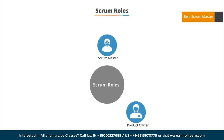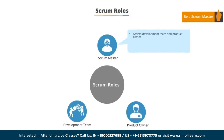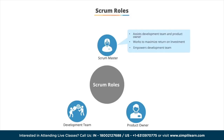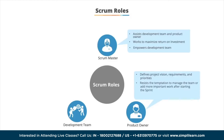There are three distinct roles in scrum: the scrum master, the product owner, and the development team. The scrum master assists both the development team and the product owner, working with the product owner to maximize return on investment. The scrum master empowers the development team by fostering creativity, removing impediments, and coaching and mentoring as appropriate. The product owner is responsible for project success by defining the project vision, requirements, and priorities.